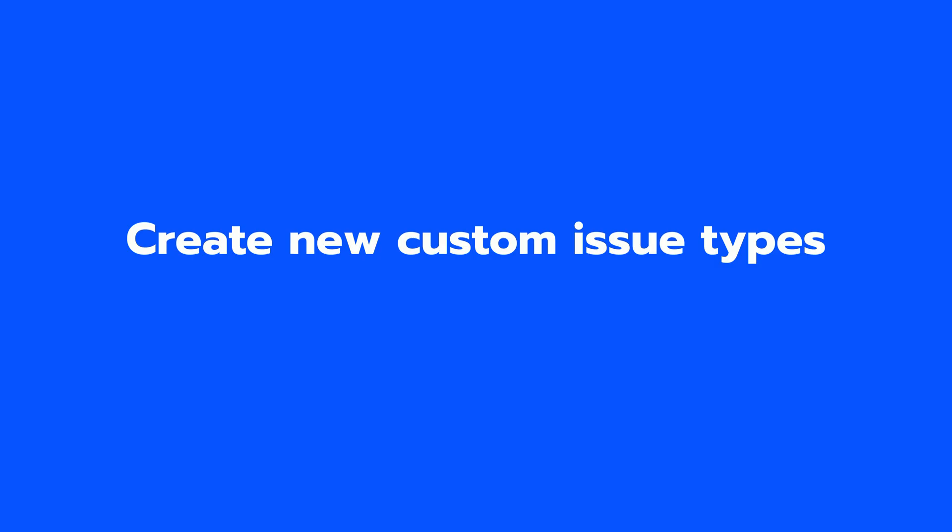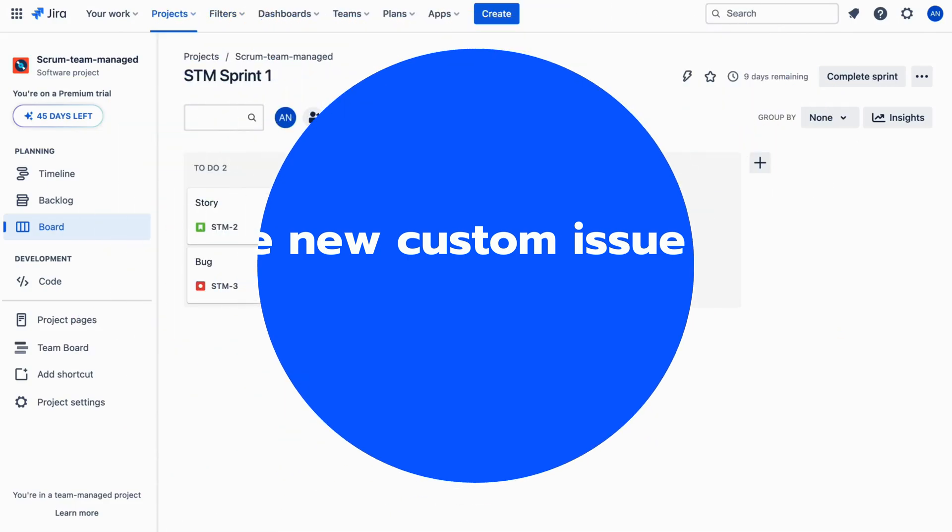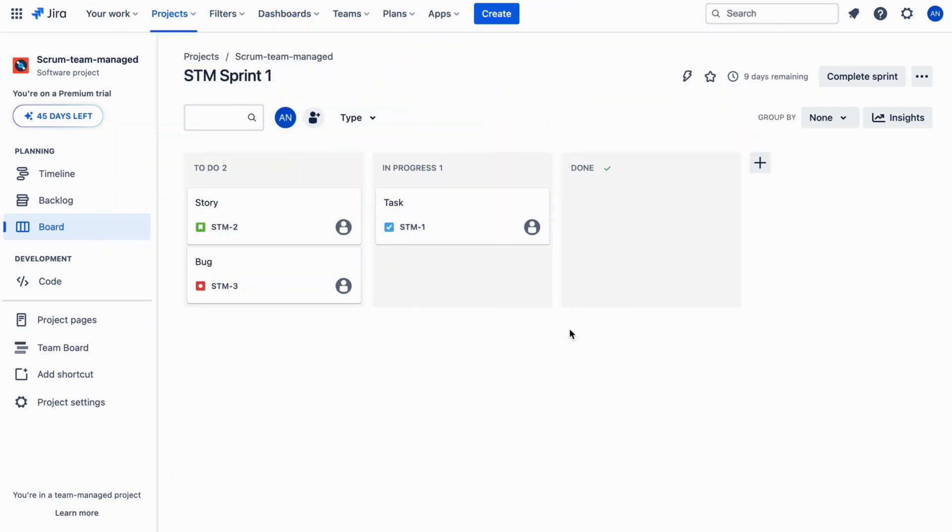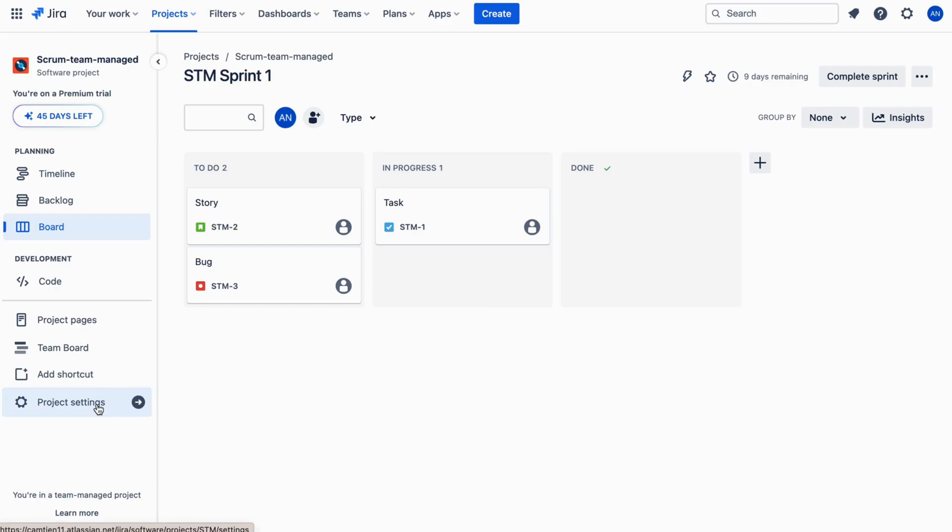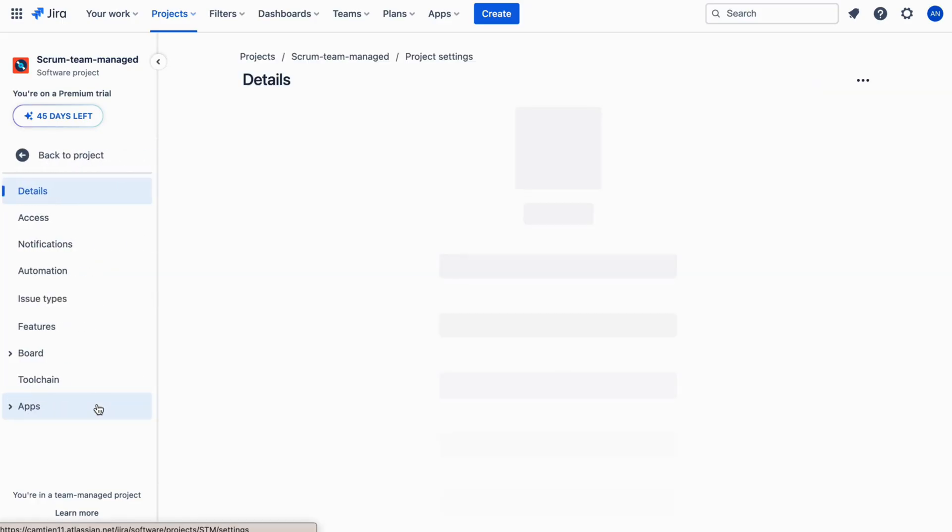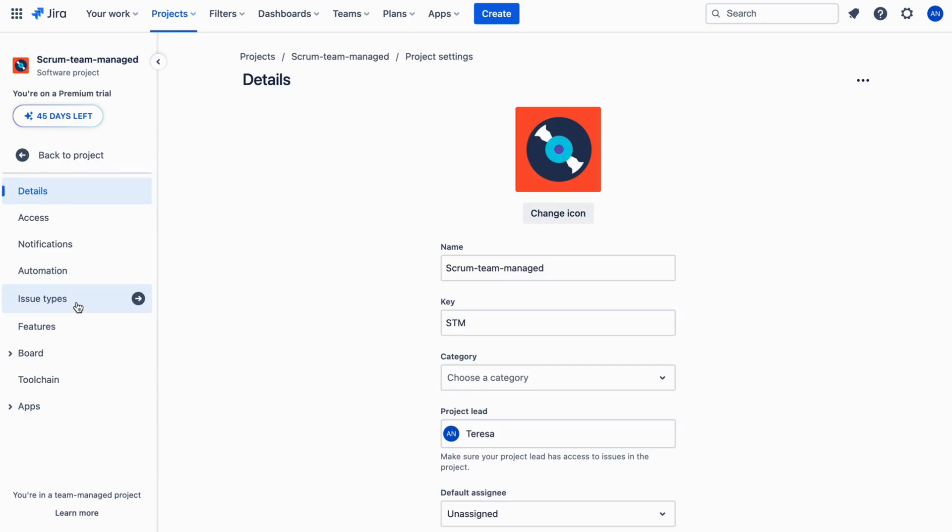Create new custom issue types. Beyond these defaults, Jira software also allows you to create new custom issue types. For team-managed projects, go to the project setting and select Issue Types.